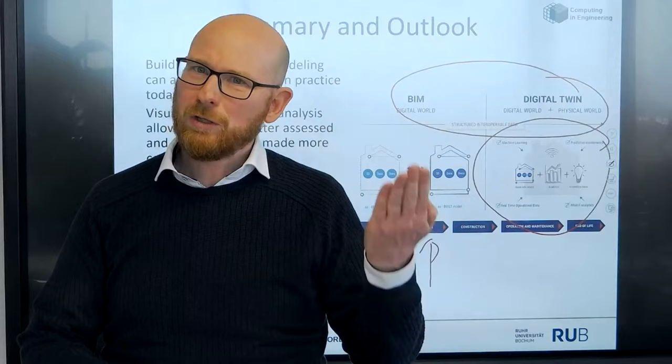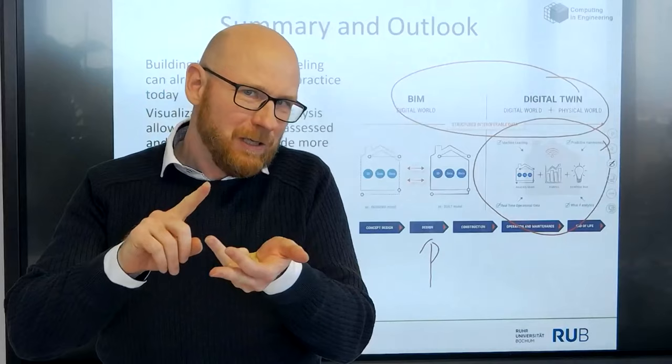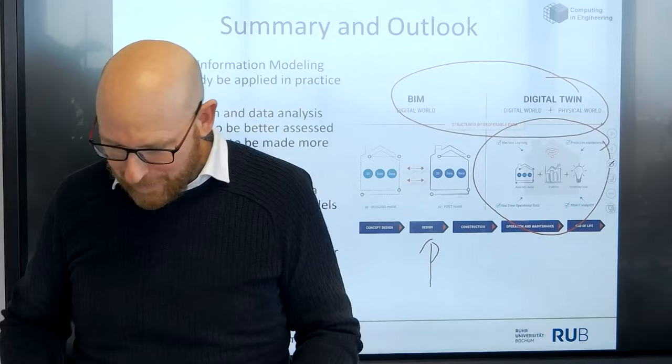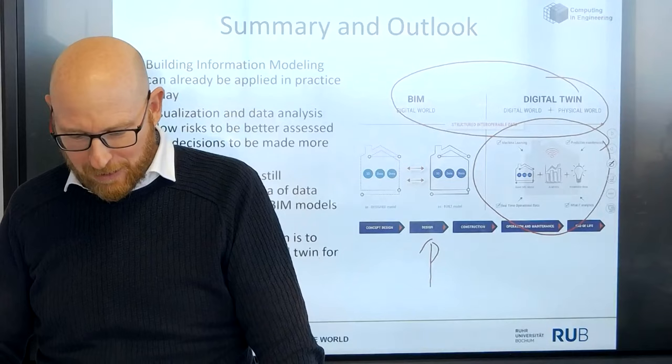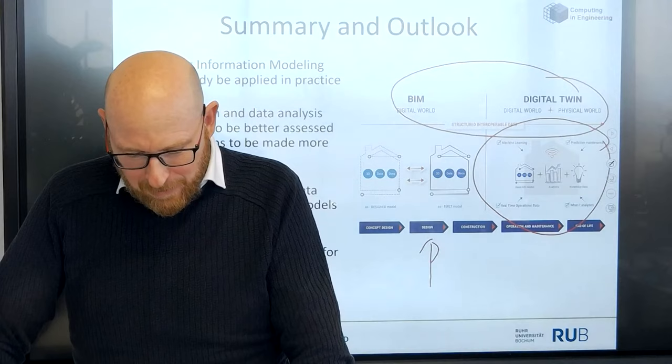So what we can check is: is the name correct? Is the range of values correct? Is it there, so is it existing? Are some connections there? What you cannot check is whether this is a good design or a bad design. For that we need engineers, but you can check the quality, and we defined some quality rules in Germany which you can apply in an automatic way, but it's not very common. And if you're interested, I can send you some links about that.